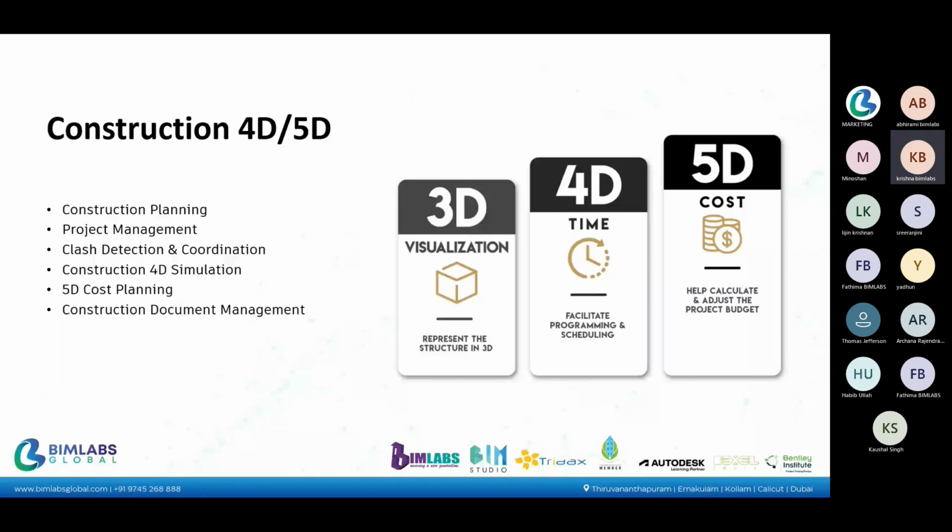4D simulation means incorporating time to see how our construction work will go. While planning our project, we divide it into different activities, and for each activity we enter how many days are required to complete it. Likewise we do the planning, and we find out the total number of days required to complete the project.